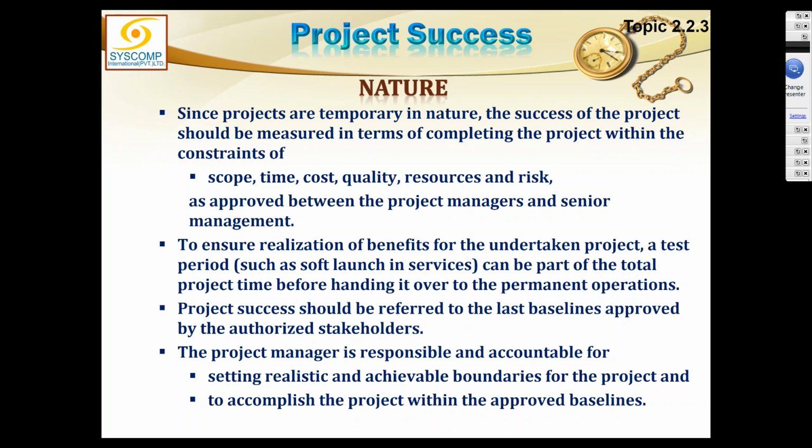A project cannot be defined without the scope, time and cost. And therefore scope and time and cost have got some other importance than they are just being the constraints. But anyways, if we only talk about the constraints, then they are not only these 3 constraints, there are many constraints. There are 7 or 8 constraints in a project, and these constraints are those constraints which affect each other. If any one of these things changes, it affects many other things. So one constraint can affect many other constraints. So if you change the scope of the project, the time may be shuffled, cost may be disturbed, quality may be bothersome, and many other things could be disturbed.